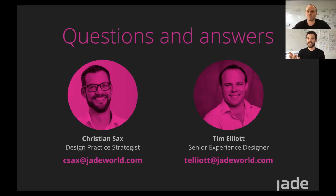Christian, thoughts? Yeah, and to add to that one, you need the experts, but you also need the person who can call the shots, the decider, because this person has to be able to make decisions in the design sprint and have the authority without going to the superiors to check in on the decisions. So they need to have all the authority from their managers to say, yep, you can make those decisions so we can actually move forward. That's quite important. So it's not like they make decisions, go out, chat to other people, come back and change their minds. This person has to be in there making the calls so we can move forward. Otherwise, it will not work.